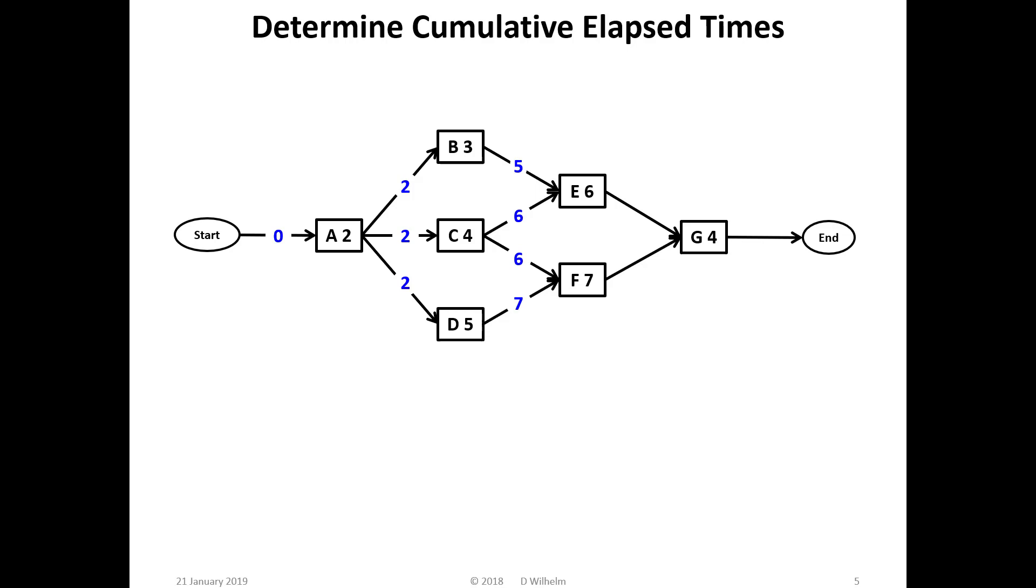Now it gets interesting. Task E has to wait for both tasks B and C to be complete before it can start. B is done after five days, C after six days, so task E can begin only after day six, when both its prerequisite tasks are complete. So, task E can start after six days, takes six days to execute, so is complete at the end of 12 days.